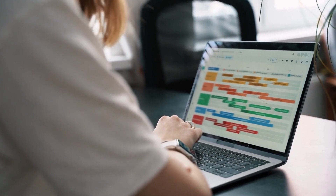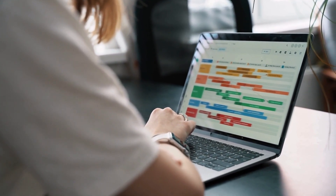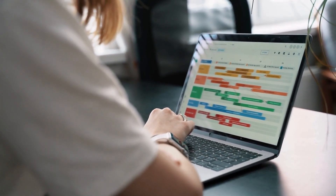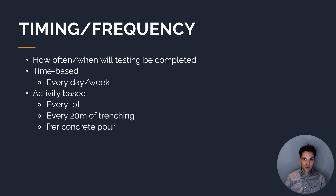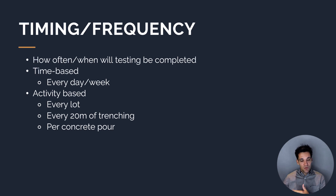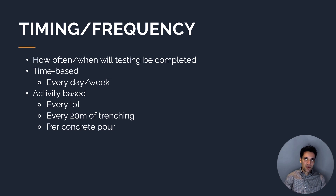Next, we need to define the timing and frequency of these checks — how often the testing will be undertaken. It could be time-based, doing checks every day or every week, or it could be activity-based, which is more common for construction works. For example, every lot of earthworks, every 20 meters of trenching, or per concrete pour — doing a pre-pour inspection, an inspection while placing the concrete, and then a series of post-pour checks.